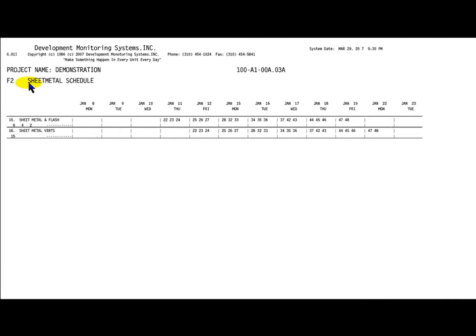Within the DMS system is a communication tool to inform subcontractors about their upcoming work. It is called the subcontractor print. While the master schedule is a current snapshot for all affected subcontractors, the system also provides each individual subcontractor with its own schedule. The form gives 2 weeks advance notice of upcoming work.